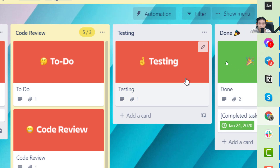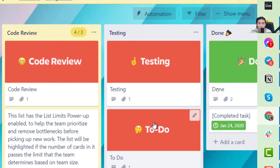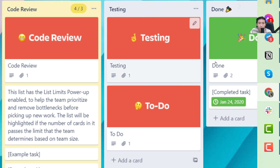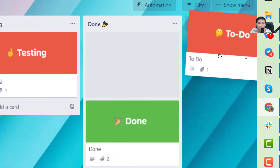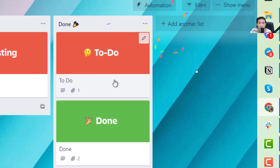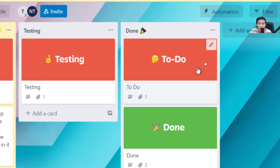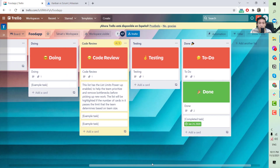When the QC starts the testing process for a task, they move the ticket to the Testing column to let the team know it is being tested by the QC and QA engineer. After testing is complete, they move it to Done to let everyone know the task has been fully tested.